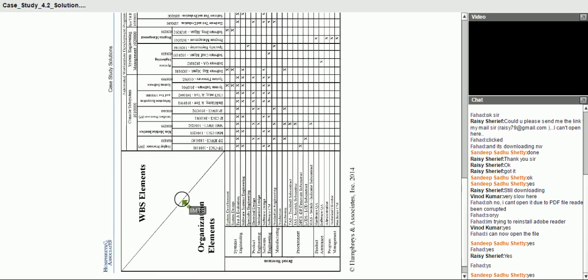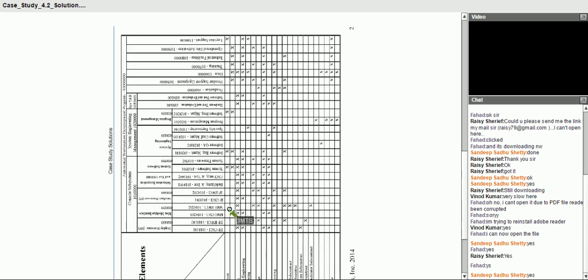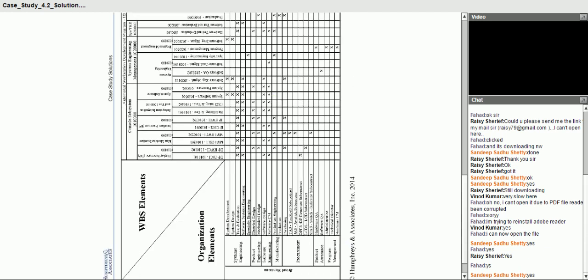This is again a work breakdown structure, and these are the different elements. How much time it will take for system development, system integration, software system engineering, electrical design, material design, software design. So this will further subdivide your work breakdown structure into elements, and for those elements you put a date somewhere. That date will tell you how much time it will require to work on that particular element. So this will help you in monitoring each and every phase of the project.